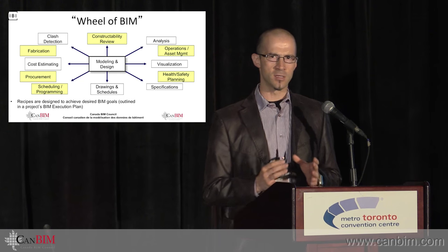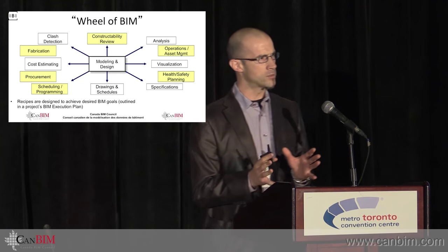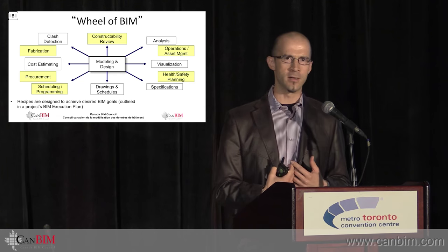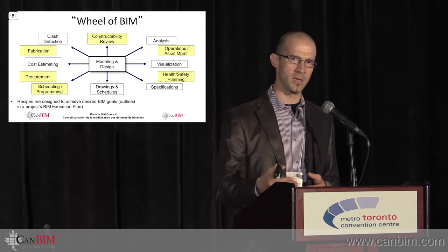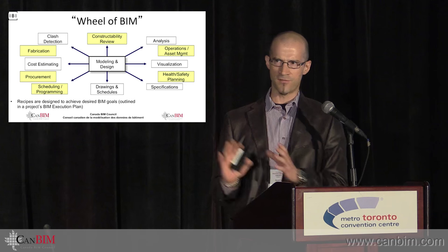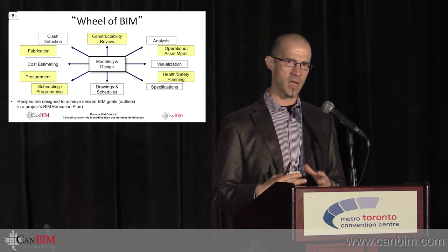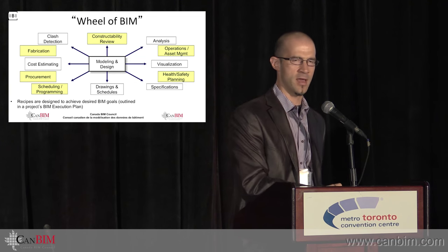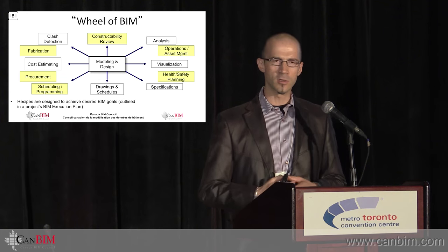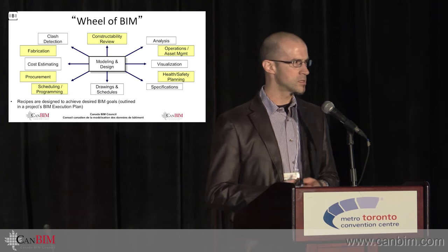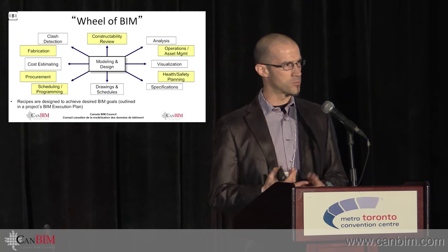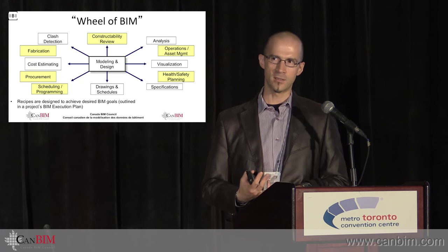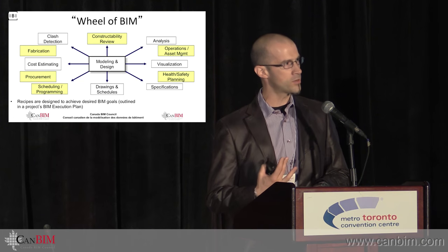And the idea there is, again, scope it. What am I going to work with? So my work with plant data in the past, I would use the model to scan for valves or pipes or pumps, for example. So it found those classes, it would list the types of components, and go ahead and edit a master spec. Similar concept for, let's say, doors. Scan the model for the component called door, look at the type of door, the particulars of it, go find corresponding master specs, and do a bit of editing for me.